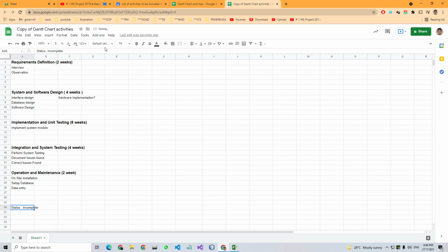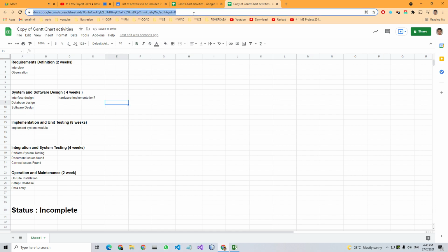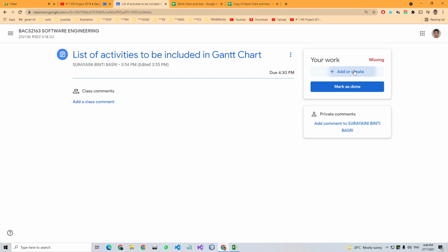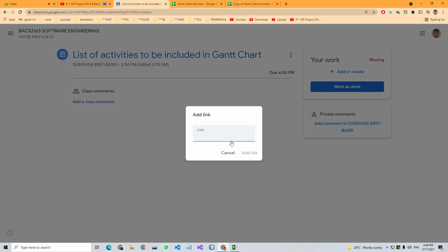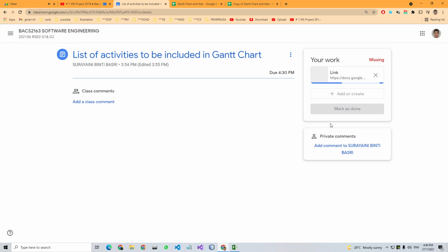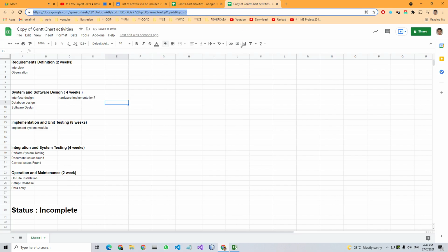First. After each of the modules is finished and tested, then you need to have one additional phase, which is integration. Yes, Kelvin, all the teams start on the same day with the same things to do.